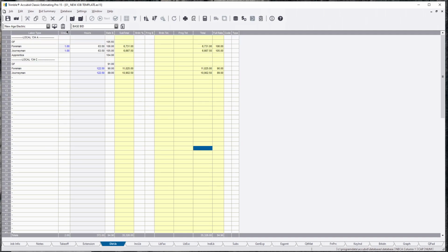This is completely different in Change Order Pro. Unfortunately, I don't own Change Order Pro, so I can't show you. But if you open up Change Order Pro, your crew is not based on one person. It is actually based on a percentage of the hours, 100%. So you would put 50-50, and it divides the hours up.